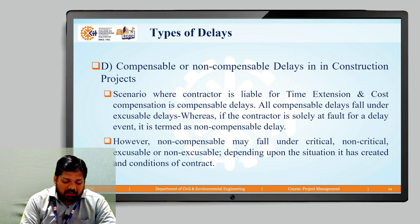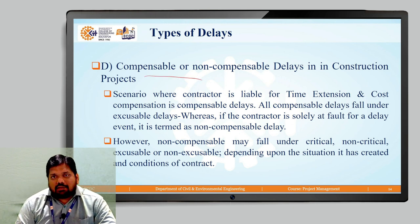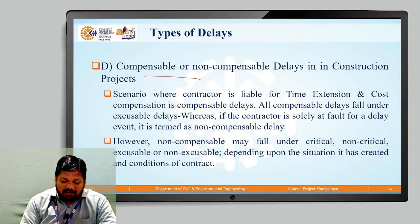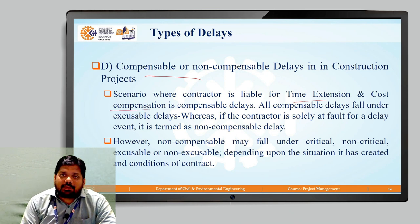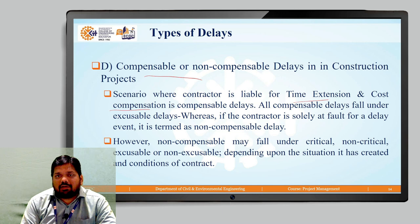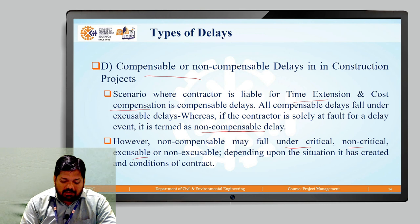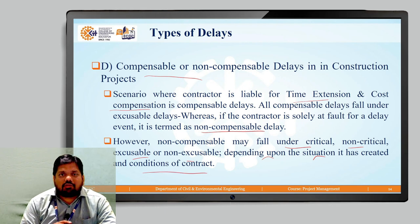The next type is compensable versus non-compensable delays. A scenario where the contractor is entitled to both time extension and cost compensation is called a compensable delay — these fall under excusable delays. If the contractor is solely at fault for the delay event, it is termed a non-compensable delay. Non-compensable delays may fall under critical, non-critical, excusable, or non-excusable categories depending upon the situation and the conditions of the contract.